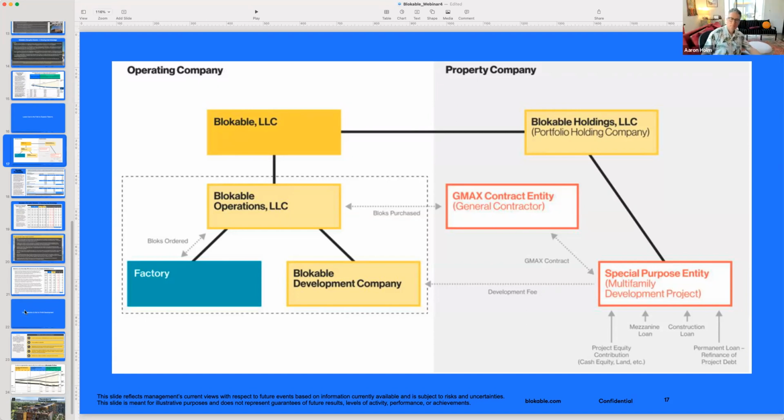Then we went a step further and said, well, if we control that design and engineering so that every time isn't brand new in terms of the process, that means that, well, it sounds obvious, but supply chain stability is really important. And to know that the base engineering allows us to order everything and always be usable regardless of the design, that means we can get a very stable input process, and the output becomes faster and faster since the building looks different, but the manufacturing is the same.